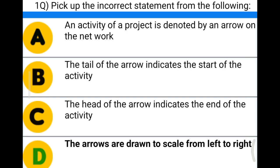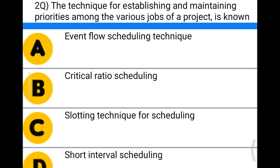Next question: the technique for establishing and maintaining the priorities among the various jobs of a project is known as — Option A: even flow scheduling technique, Option B: critical ratio scheduling, Option C: slotting technique for scheduling, Option D: short interval scheduling. The correct answer is Option B, critical ratio scheduling.